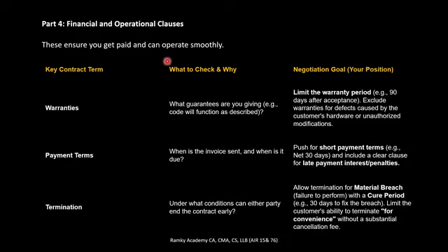So, financial and operational clauses. Warranties. What guarantees are given? For example, you have developed a software, and that software is delivered to the customer. After delivery, a customer has to check and use it, and if they find any requirement changes or any bugs in the software, they have to tell us within 90 days and we can fix it free, right?